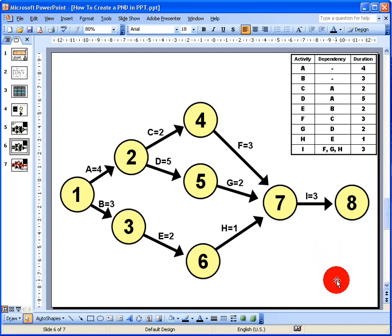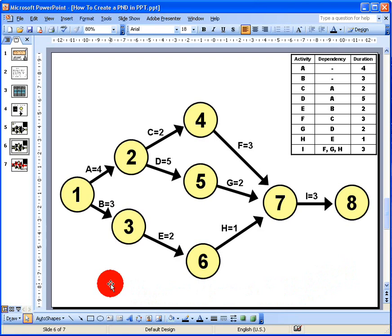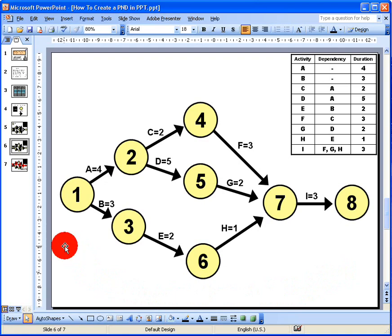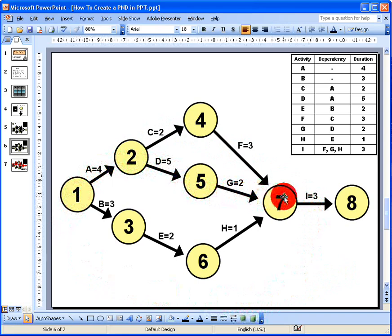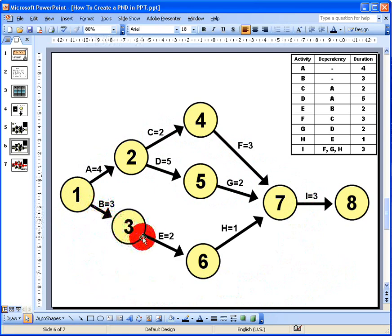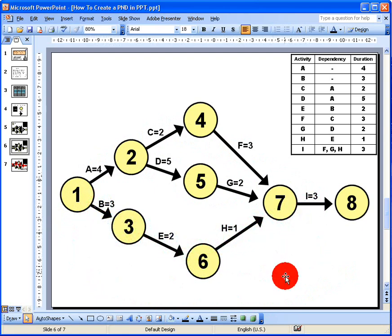Looking at the diagram, there are three possible paths: path one goes through activities A, C, F, and I; path two goes through A, D, G, and I; and path three goes through B, E, H, and I. To find the critical path, we add up the durations along each path to get the overall duration for each.